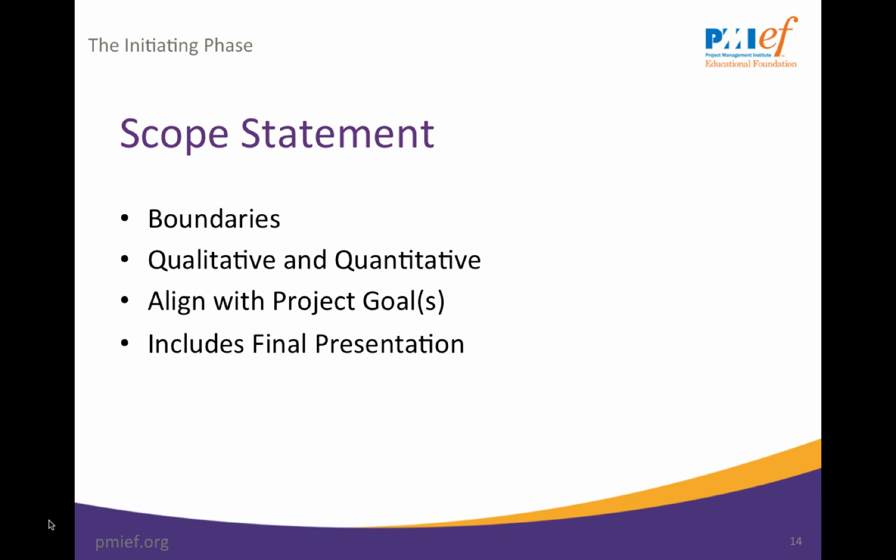A scope statement can be qualitative or quantitative. It should align with the project goals. Once the scope statement is written, it is useful to review it against the resources, constraints, and assumptions to ensure that the scope is realistic. The final presentation or celebration of the project should be described in your scope statement.